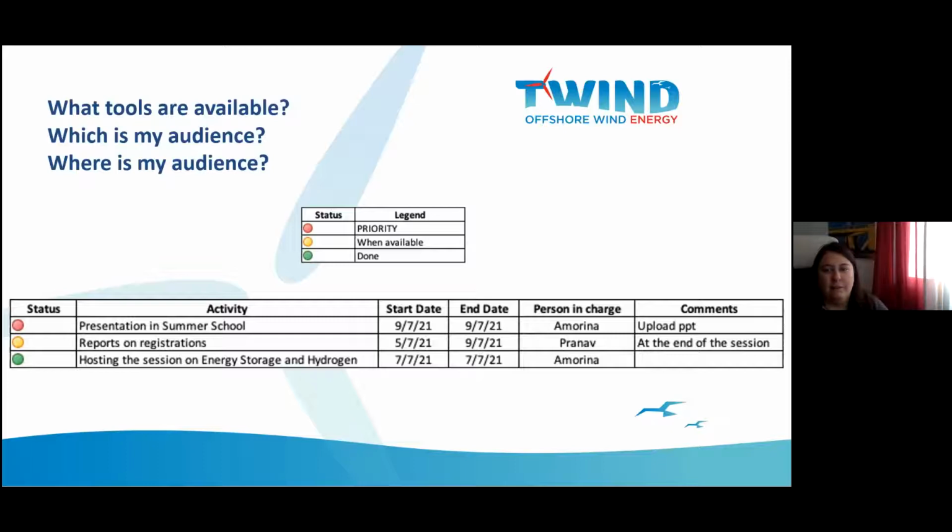For example, to the guard at the front desk, you can say, I am waiting for a delivery from company X. When it arrives, please send it to the warehouse. And to the maintenance crew, you can say, when the controller arrives, let me know. But if you mix them up, the controller, which is also the term used for the person responsible for controlling the budget of the project, could end up in the warehouse. Even though English is in many cases the main language for communication, certain technical terms could have more than one meaning.